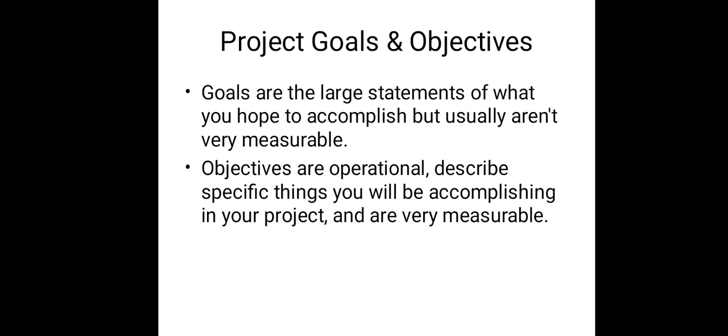Try to ensure that there is a considerable overlap between the goals and objectives for your proposal and the goals and objectives of the funding organization. If there is not a strong overlap of goals and objectives, then it might be best to identify a different funding organization. Because if there would be a gap between our goals and the goals of that organization for which we are going to build a proposal, then obviously it would not be acceptable.